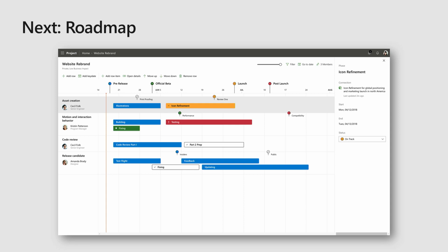Roadmap allows us to create that consolidated view at many different levels, from the departmental level all the way up to divisional leads. We can create specific key dates and bring in data from different project sources, including VSTS, Microsoft Project, and PSA, and consolidate that data into these roadmaps. We're pretty excited about this capability. It's something we're investigating and we're going to be deploying throughout Microsoft. Tomorrow we have a deeper dive into PSA and how that works with this.